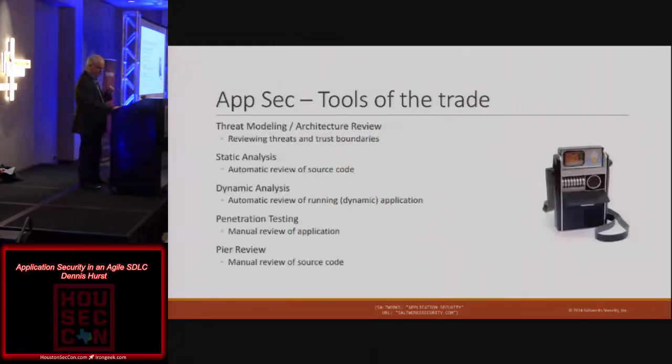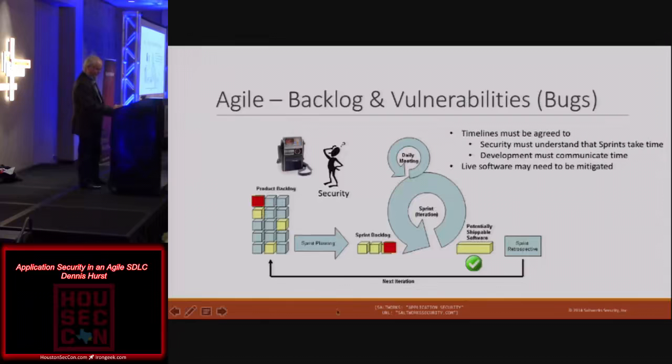Agile, kind of around here at the end of it, what's going to happen is in the last sort of quarter of the scrum. If you're on a 2-week scrum, it's like Wednesday to Thursday typically. What commonly will happen is Tuesday night they'll put a build in. Wednesday night, Thursday, you're doing most of your user acceptance testing, reviews, reflection, kind of going, did we build what we said we were going to build? What messed up? Where are bugs? Where are defects? What do we got to do next time? They're planning their next scrum out.